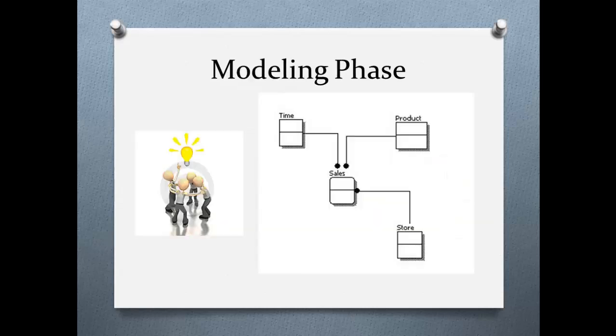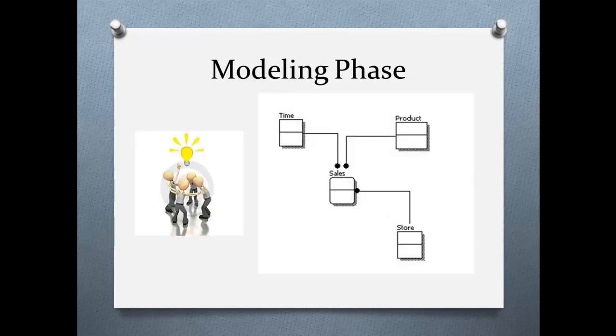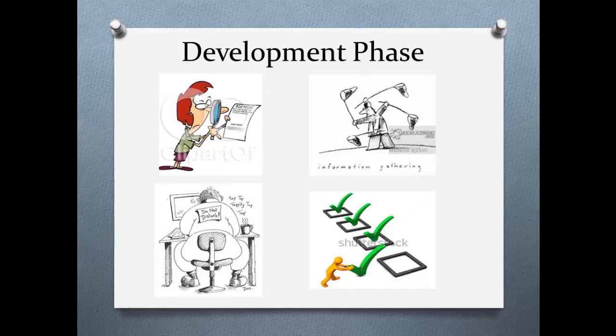So if the modeling phase is done and ready to move on to the mapping phase, they're gonna ask the data modeler or the head of the data modelers to give a sign off from the modeling phase. Then same with the mapping phase, and every phase will have the sign off. Okay, just to make sure that everything is done on our end, and now they can move on to the next phase.